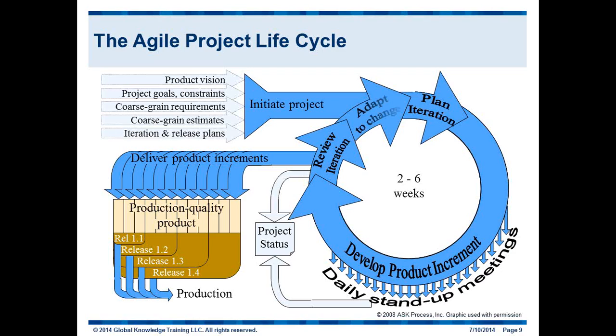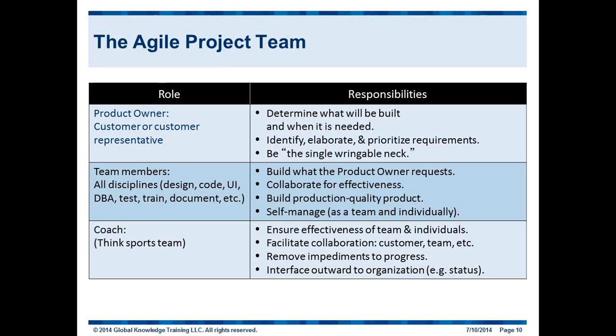One of the things that I wanted to add to this is when we're going through this process, it's important to note that Agile teams always deliver what they promise to deliver, at least that's our goal, but it doesn't necessarily mean it gets released to production. The team, as well as the customer, will decide when we release to production. Generally speaking, the teams will go through 2, 3, 4, 5 sprints or iterations to develop enough code such that it makes sense to do a release, because as we all know, there's a significant amount of overhead in a release.